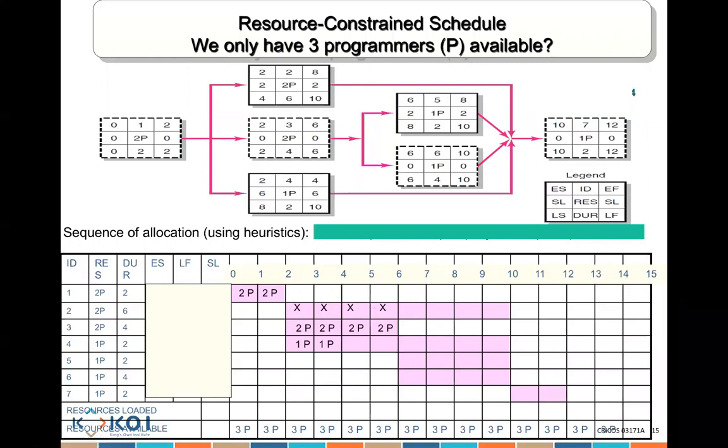Okay, because what you are assuming is you cannot finish that activity without having 2 people. So you're assuming you need both people at the same time for the job to be completed. And if I allocate 1 person, it won't finish the job. So you need 2 people to be available at the same time. Does that make sense? I mean, yes, kind of, but let's say for example, task 2 requires 6 days, correct? Correct. But that's 6 days if you have 2 people.